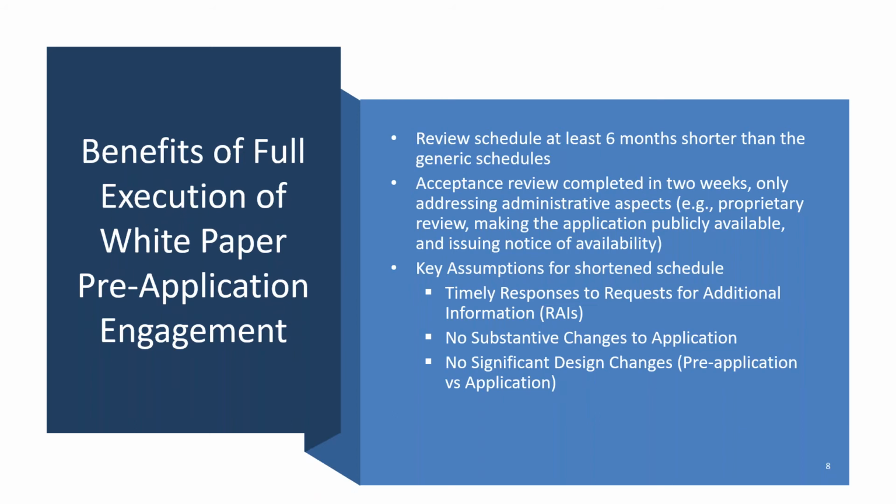And lastly, not make any significant design changes from the application to the application, meaning if you had put forward a specific element of your design, such as, for example, fuel, and that has been reviewed and approved through a topical report in pre-application stage, you should not then be making significant changes to that when your application gets submitted or throughout the life of the application, because it would potentially impact that review schedule that we were able to offer to you.